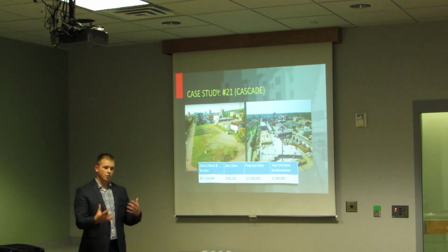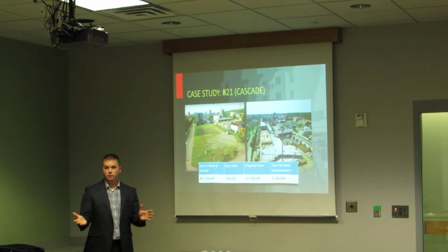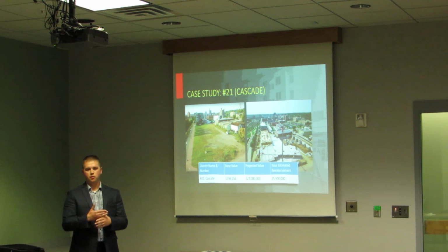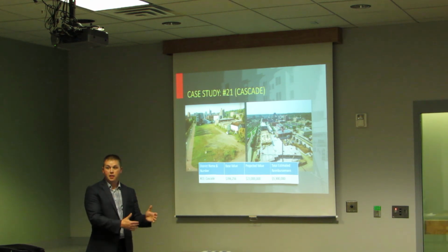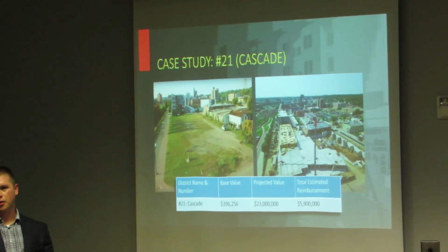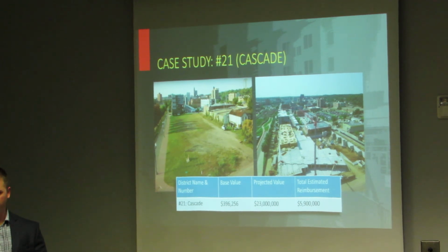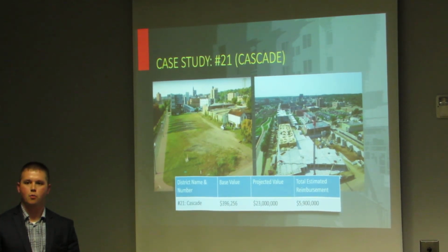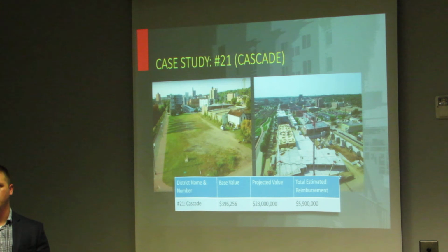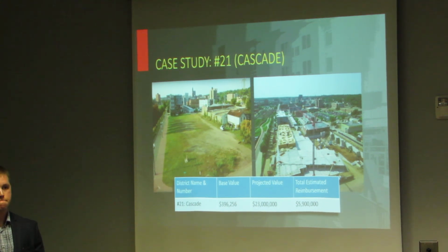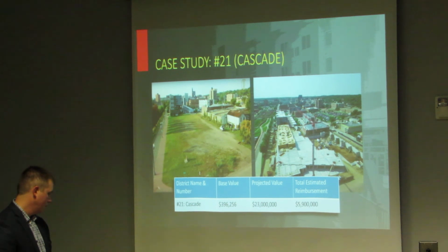It's another thing we've thought about, not just for the city property ones. Going forward, we are going to consider putting in our TIF agreements that the project needs to be started within 24 or 36 months, because we've had a few that get issued a TIF and then don't start a project. If they don't start soon enough, we may have to amend the plan. We've issued this with the understanding that the project would move forward.